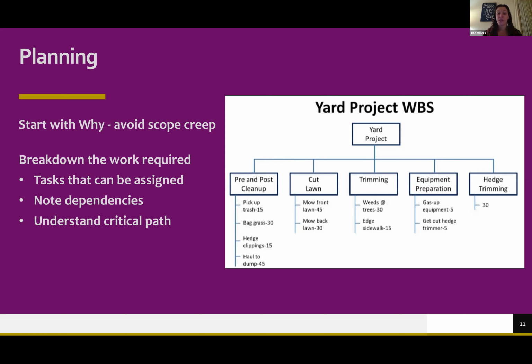So that also leads me to understanding the critical path, right? So the fastest way, or the things that have to go in order to be able to accomplish your end deliverable or your end goal. So I have to warm up the water and that takes 3 minutes. And then I need to set the bottle in the water and that takes 2.5 minutes. And then I can give him the bottle. If I pull the bottle out of the fridge and I set it on the counter before I start warming up the water, I'm adding time to my process. So anyway, simple example of dependencies and critical path there.